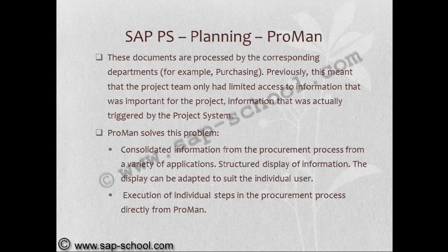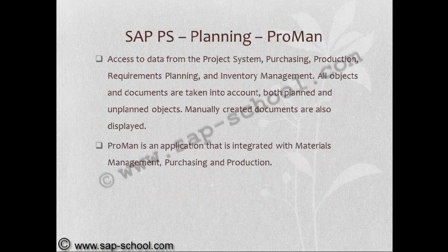Now, ProMan solves problems like: consolidating information from the procurement process from a variety of applications, structured display of information. The display can be adapted to suit the individual user. Execution of individual steps in the procurement process directly from ProMan. Access to data from project system, purchasing, production requirements planning, and inventory management. All objects and documents are taken into account, both planned and unplanned objects. Manually created documents are also displayed.